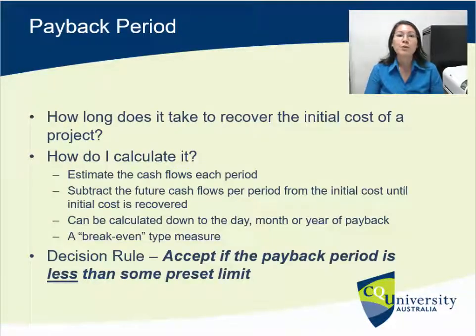With the first one, the payback period is probably the easiest to understand. It's how long it's going to take me to be paid back for the initial investment that I've made into this project. We have to estimate cash flows for each period, and then starting from the initial investment amount, take off all of those cash flows until the initial cost is recovered. Every year we take off the incremental cash flows that we get until finally we've been paid back for our initial investment. So it's essentially a break-even type of measure.